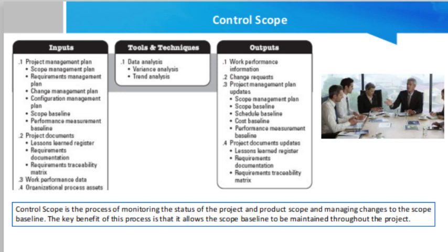Configuration management plan. The process is used to identify the components that require formal change control and to implement the change control process to monitor the desired changes. Scope baseline. The scope baseline is the approved project scope and is used during scope change management to determine and prevent scope creep. The scope baseline primarily comprises the project scope statement, work breakdown structure, and WBS dictionary. Only upon implementing this scope baseline can the project be directed in the right direction.